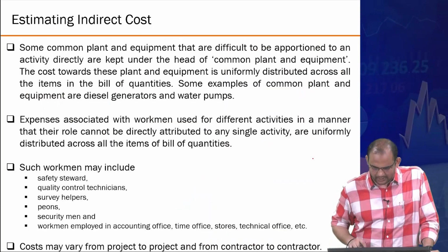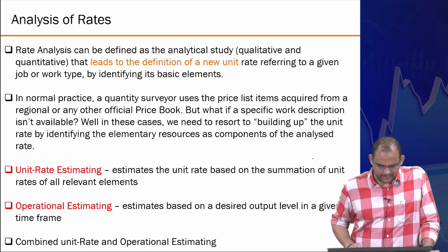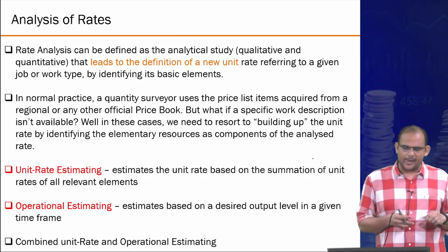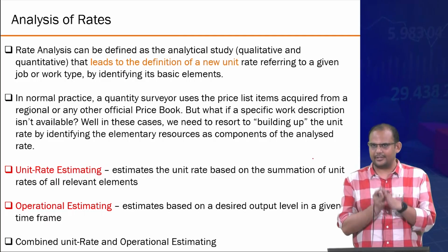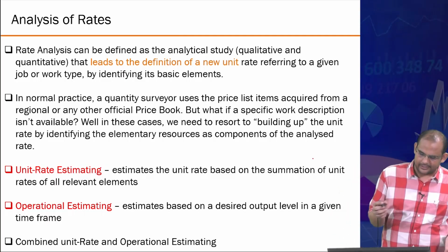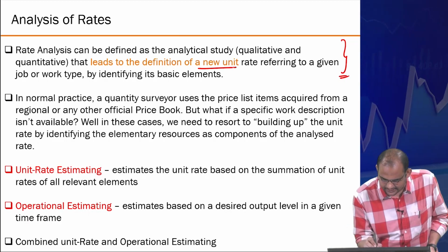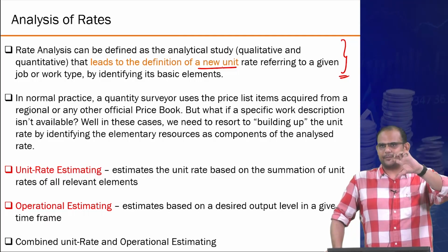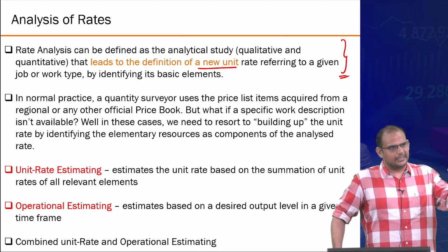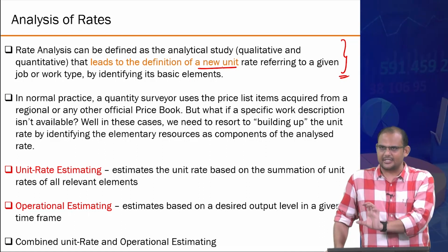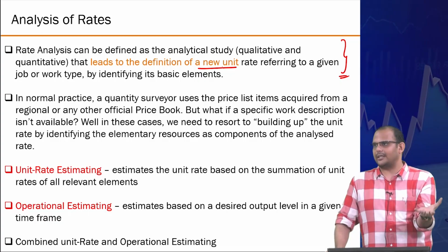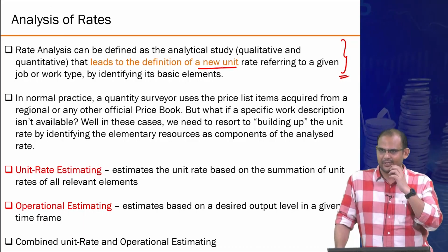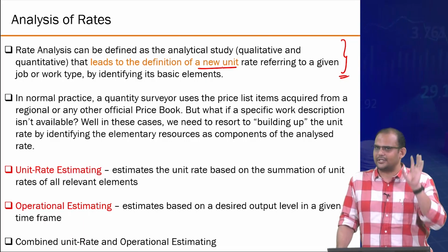Okay. All right. So I'll just leave it here. You can go through these slides later. Again, just skipping one slide. Now, essentially, how do you do this? Right? That's the idea. So one basic way of dealing with this, or the simplest way of defining it, is you define something called a unit. You estimate all the charges per unit, and then you simply multiply the number of units with that per unit cost to estimate the total cost, and similarly you keep on aggregating different types of units. That's the idea.